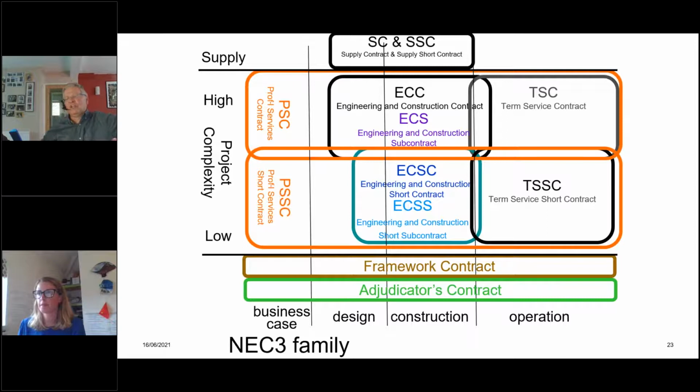Absolutely. So that's what, when I was a young lad, we used to call construction management. Basically, you then have a separate contract for each of the different contractors. Those separate contracts could be either the construction contract or the short contract or whatever. Then the construction manager, that's the consultant you're talking about, they help a client put together those contracts, and then they help the client manage those contracts. So the construction manager themselves might be employed under the PSC or the professional services short contract, and the actual construction contracts that are used to deliver the physical works can be any of these contracts, logically the ECC or the short contract. So good question, and hopefully that's a good answer.